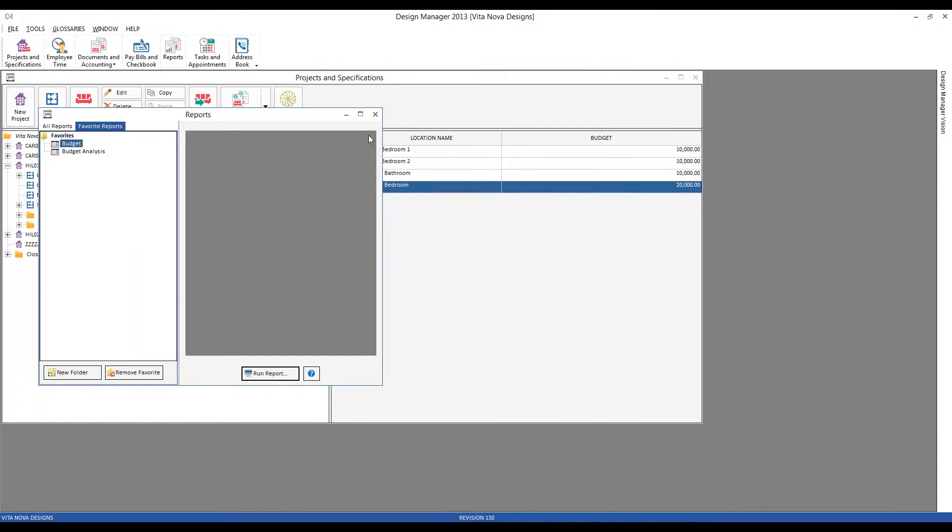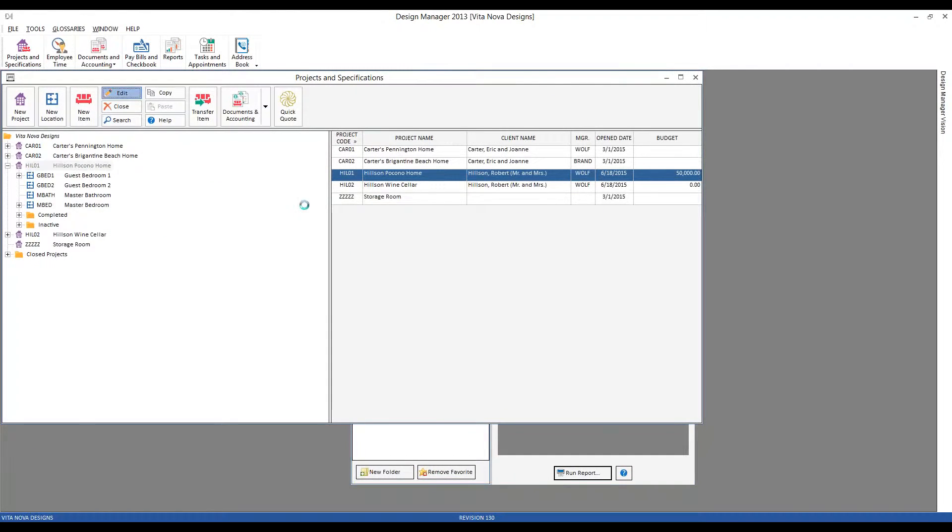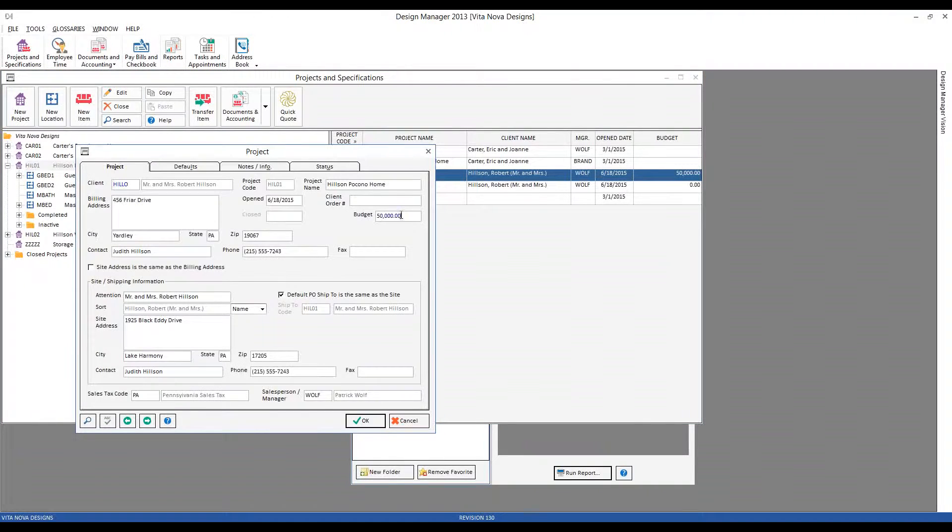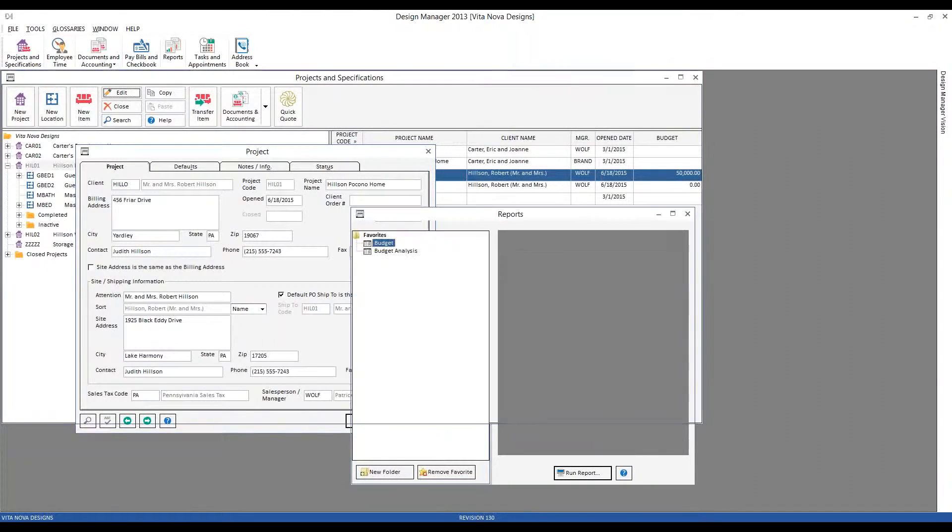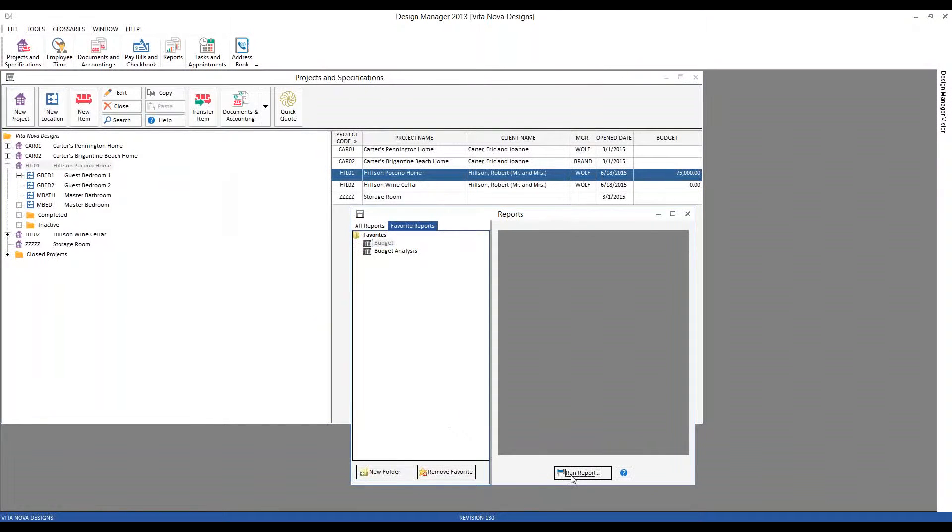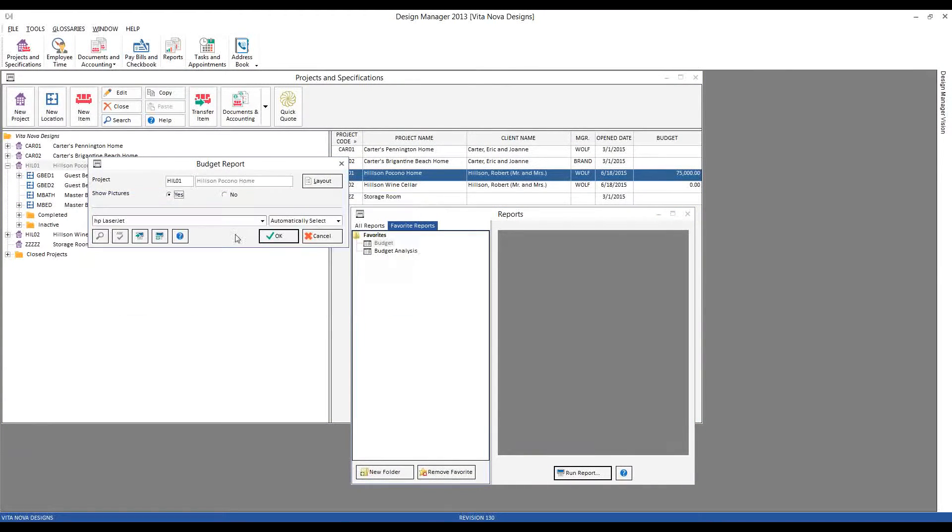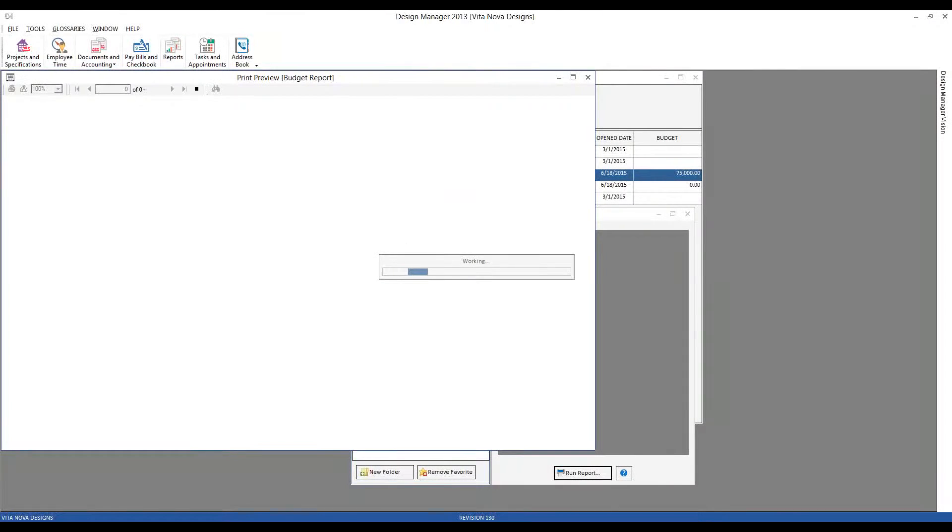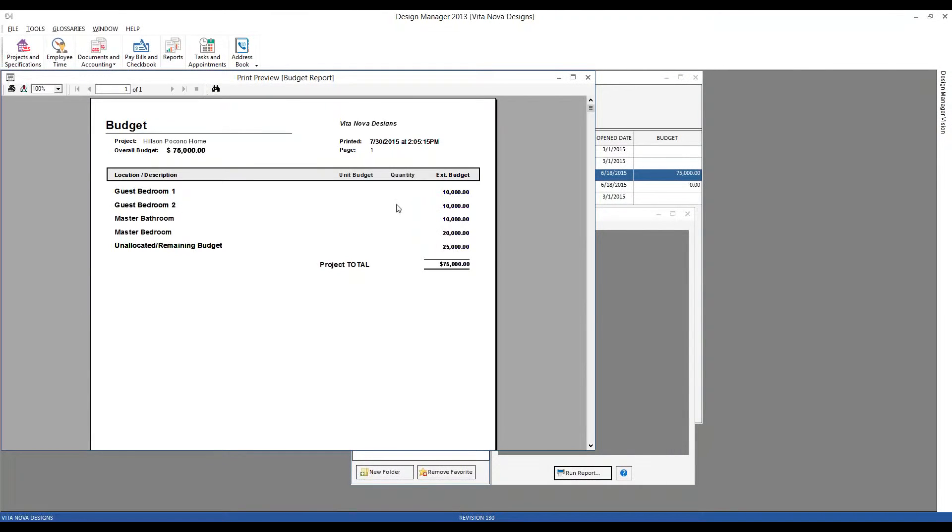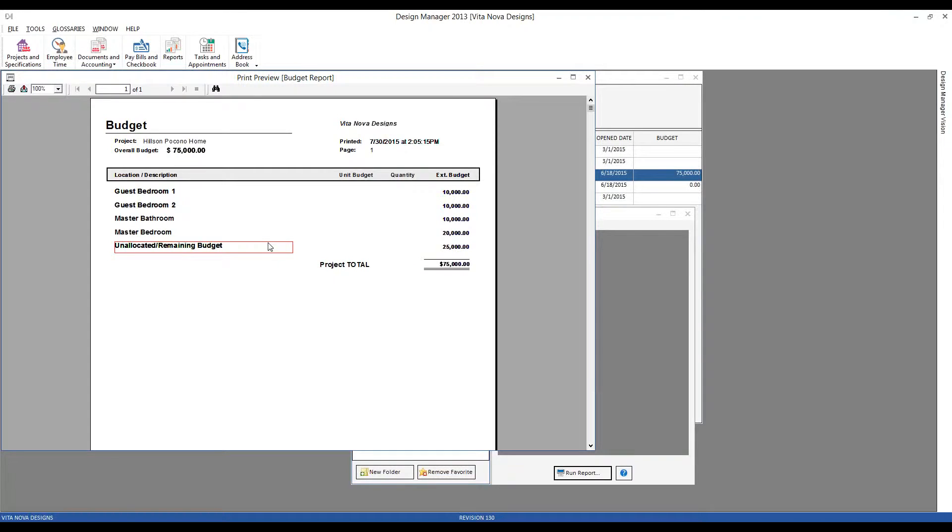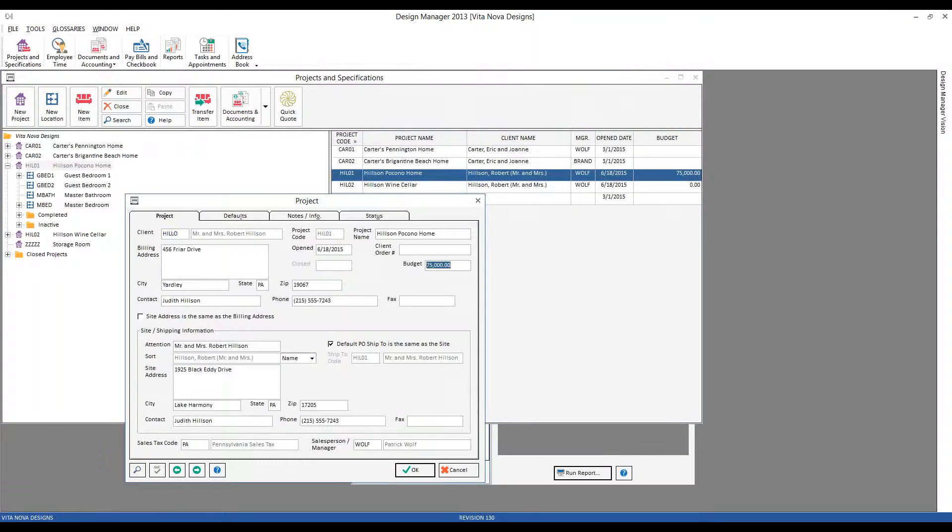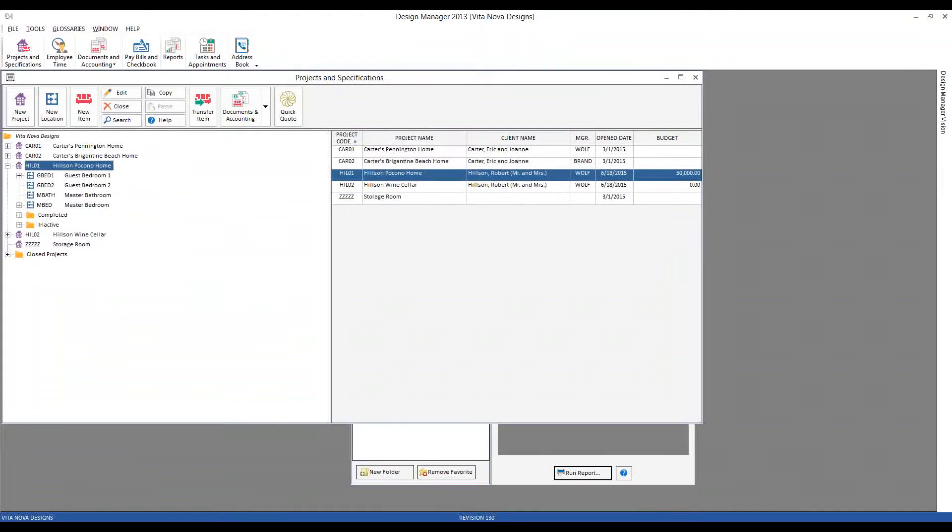Now, if we did not fully distribute the entire budget, Design Manager would show that as well. So let's imagine that our project budget was, oh, I don't know, let's say $75,000. So we'll print the budget analysis again. Now we can see all of our locations, the budget remains unchanged for those, but we have an additional line automatically created for our unallocated remaining budget of the difference of the $25,000. So Design Manager will always keep you abreast of how you're allocating the overall budget to the various locations. Let's go ahead and bring our budget back down to $50,000.